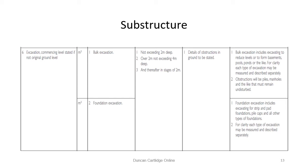As can be seen in Level 1, the classification for this item is bulk excavation, which includes, according to the notes and comments, reduced levels, basements, pools, etc. The taker off may choose to classify this item as bulk excavation or, if preferred, reduced level excavation. In fact, most QS's use both terms as shown on the next page.